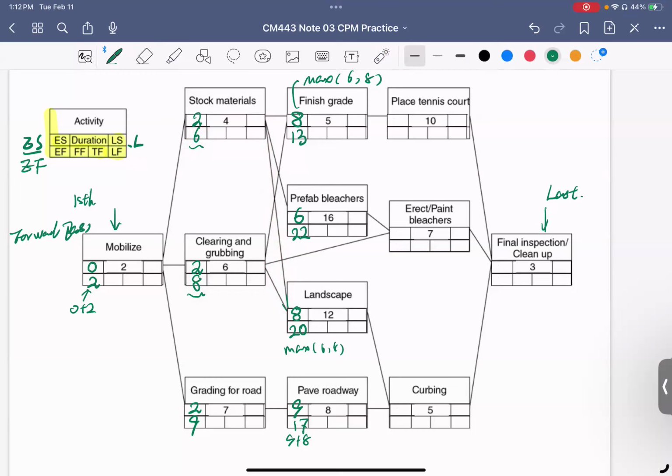All right, so we're moving to this column here. First you have the finish grading. There's only one relation, and this has 2 relations, and this has 2 relations too. So easily doing this one, come from 30 here, and you get a 23 here. And this one you will be from here and there, 8 and 22. So basically you have the 22 here, and then 29. So the 22 is equal to the maximum of 22 and 8.